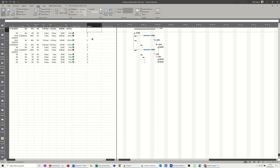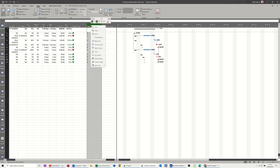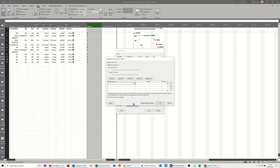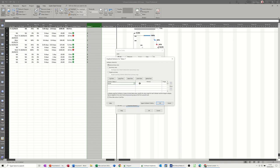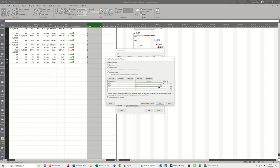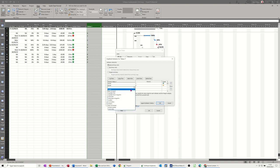Now I need to go and do the graphical indicators again. So custom fields, leave that selected, go to graphical indicators. So it is going to be equals again. And then if it equals 1, this time, you want that to be green, it's complete. And then if it equals 2, it's going to be amber. And then if it equals 3, it should be red.